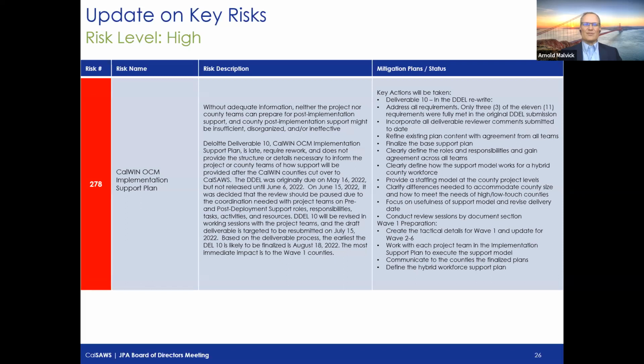There are still others that we are pursuing just to build more cushion into the database scaling and performance, because we know as we come on, this first wave is 2 smaller counties. Wave 2 has 4 larger counties. It has more data. And that's also why we're having the discussions around do we really need to convert everything over? Do we need that full 20 years of data, as well as a partial of that risk mitigation around it? So I think there are more conversations that are going to be occurring within the next several weeks around that as we look at waves 2 through 6.